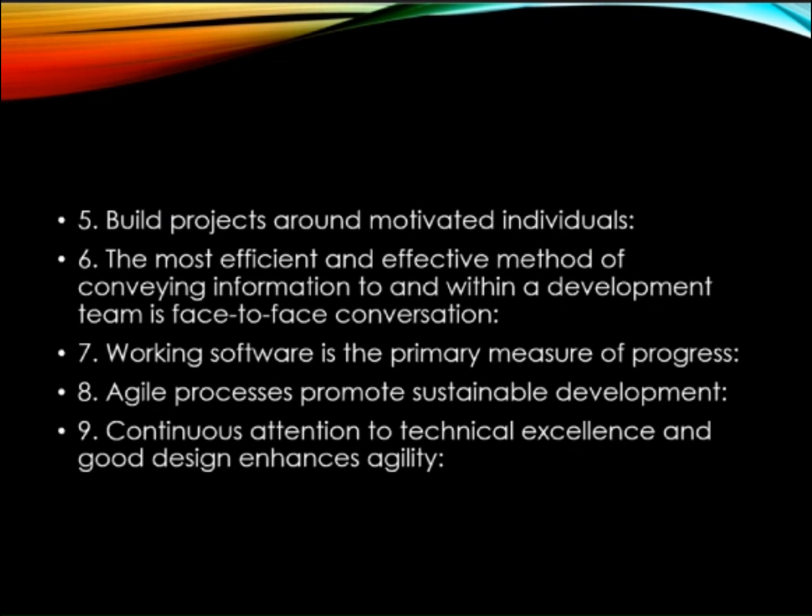Eighth, maintain a constant pace. Don't overload the team. Keep a steady, healthy speed. The team agrees to take 5 user stories in one sprint to avoid overtime and burnout. And ninth, continuous focus on technical excellence.